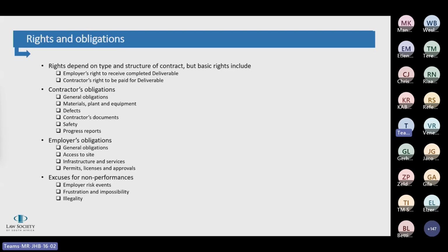So typically you'll see reports on actual resources on site, the progress of the work, and risk items, which are often categorized according to the traffic light system. So green being not a high risk, yellow, medium risk, and red, high risk. It'll include mitigation strategies, etc. So this is just a tool used by both parties to see where the project is actually at, identify risks, and properly manage the project work.